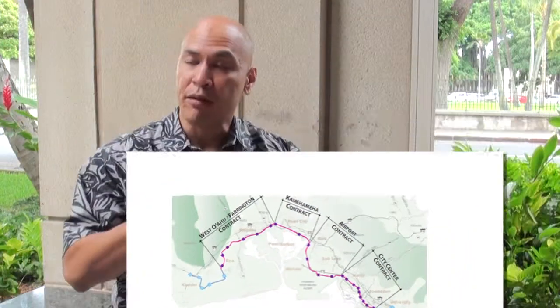Okay. In addition, we have each of the stations. The stations along the alignment, the 21 stations, they're all grouped together, either in 3 or 4 packages. Those are also going design bid build. And that we also want to control, because when you get into architectural aesthetic features, it's hard to leave that to a contractor who's going to drive reduced costs when you want to control what that look will be. Okay, organization.